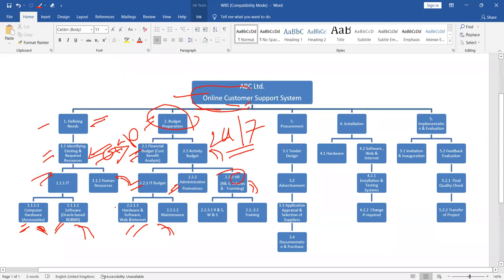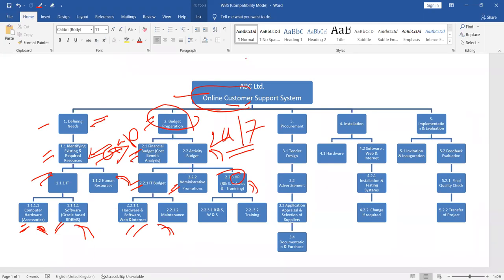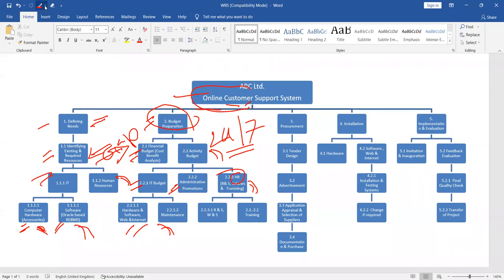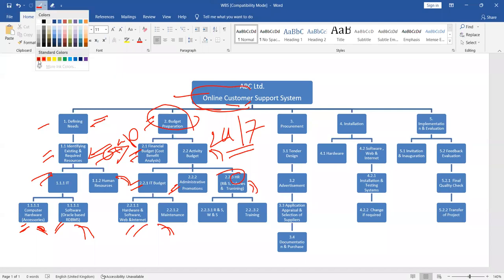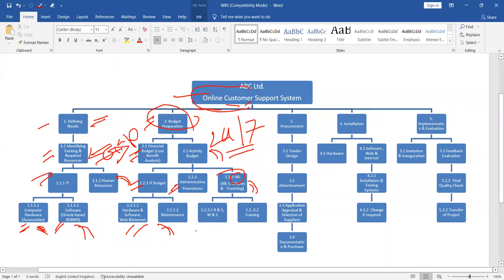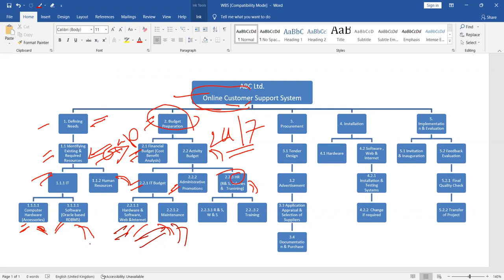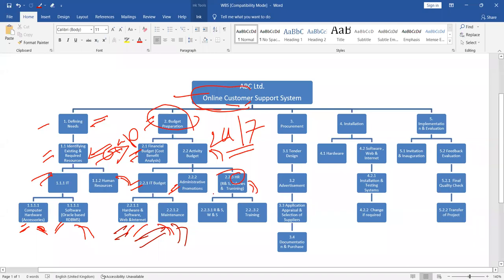If you can't go for work breakdown structure, believe me, so many cases, even in Bangladesh, still we find many organizations that have no idea about work breakdown structure. What they did, they are facing problems. How they are facing problems? They have hardware budget. They have software budget. But they don't have maintenance budget. And what is happening? After six months or one year, they are unable to run their system successfully because shortage of budget. These ways, work breakdown structure really helps you each and every component you need to cover within a task.